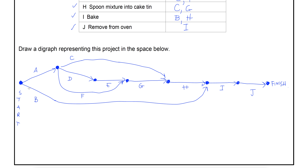We'll put the finish vertex over here. Then we put the durations in: J is 25, K is 40, O is 10, L is 20, M is 35, and P is 15. Notice we use the correct notation — the label comma the duration. And there is our completed activity network for that table.